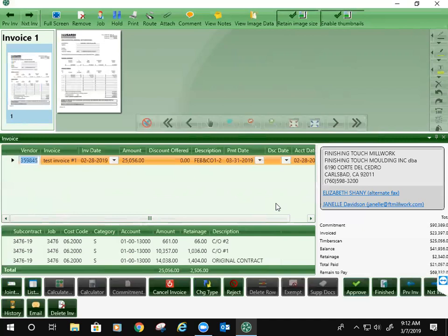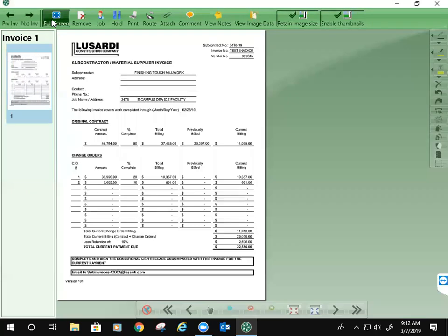So Stan has streamlined our billing form, and if you'll notice, I know that's small, but there's no longer an area for you to initial down at the bottom, because now you're going to be doing that electronically. Accounting has been pushed to get every sub on every single job that's active a partially populated billing form, and then we're forcing them to submit them via email.